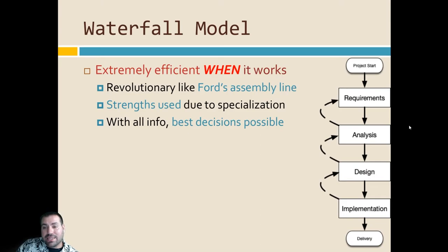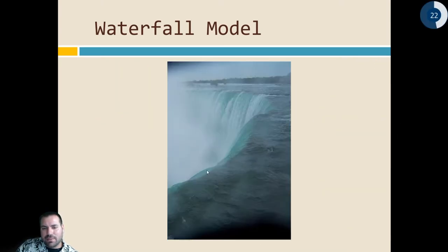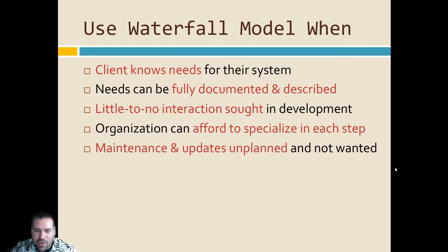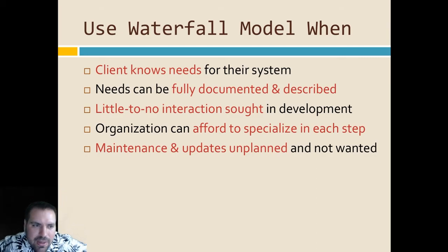So when it works, this is fantastic. And as the imagery and the name imply, as I mentioned earlier, you can't really go up the waterfall. It's meant to start here and end at the bottom without ever going up. It's very hard to go up. It's like going down Niagara Falls in a barrel. You can't go backwards. There's no paddling up the waterfall. So the problem with this is the clients need to know everything, all the requirements, exactly, down to every last detail, before you begin working on the project. If they don't, then Waterfall isn't really going to work.